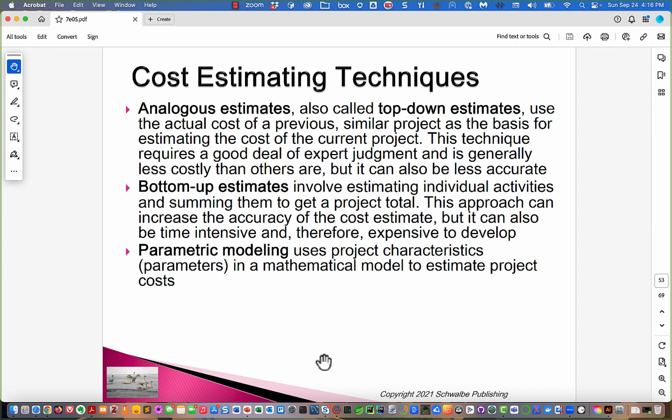So one weakness of a bottom up estimate is it says what your costs will be if you utilized everything 100%. Well, what if you were not able to utilize everything 100%? What if things have idle time? Well, in some organizations, those are just going to get charged to your project. Okay. So, one problem with a bottom up estimate is it might underestimate what your project is going to be charged. Okay.